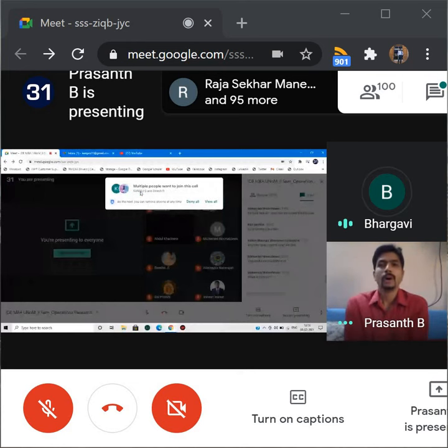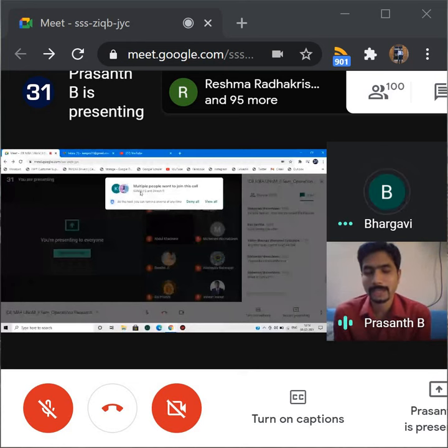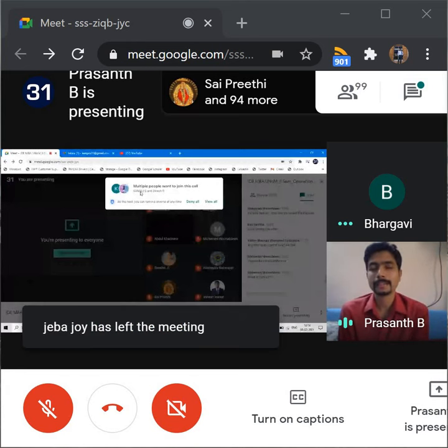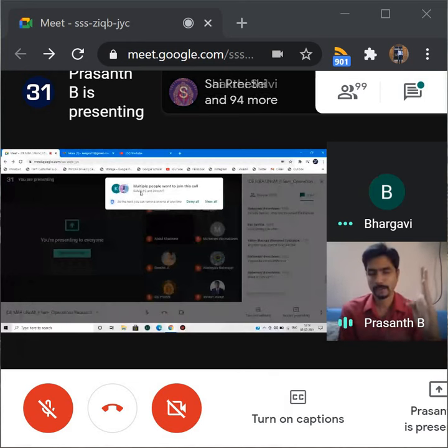All right. Okay, so there are different rules in which you can construct the network diagram. The rules are given by Fulkerson's rules of networking or network diagram. You start from the left and proceed to the right. This is the first rule. Second rule, the activities should be specific. No activity should be repeated, and no activity should cross each other. So there are many different rules.